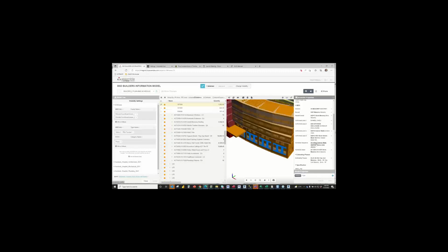As well, I get down to schedule sequence, schedule detail that I'm using in my schedule tasks that you can see manifested there. I can also, like with project parameters, identify PSI of concrete, pounds per cubic yard of reinforcing.